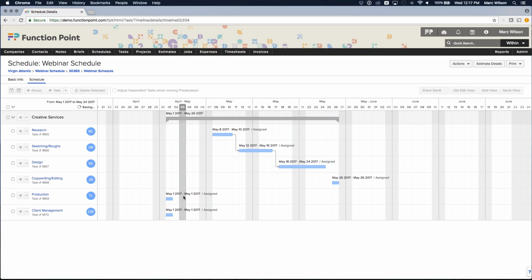And you can do some pretty cool stuff. So for example, I can bring in these 2 tasks here, and perhaps I want them to be equal in time, but I want them both to be dependent upon the completion of the previous task. So notice how there's a multi-task dependency that's occurring here. And I'm doing it all with just my mouse. I know a lot of people don't like to use their keyboards. They're more mouse people. So I'm just dragging in dates, making the connections. It's really, really easy to work with, and it's a huge improvement over what it was before. So I'm really happy about it.